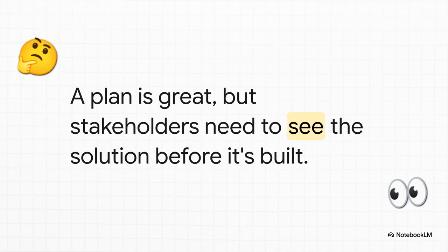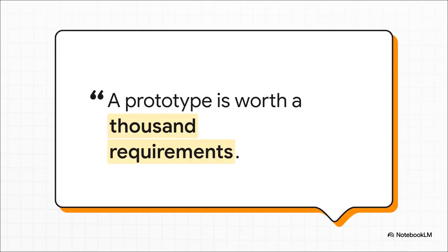But here's the catch. A list of user stories in Jira, no matter how perfectly you write them, doesn't always paint the full picture. To prevent those costly misunderstandings later, stakeholders need to actually see and feel what you're planning to build. And this quote just nails it. A simple, clickable prototype can answer way more questions and uncover more hidden issues than a 100-page requirements document ever could. It just makes the whole thing tangible.